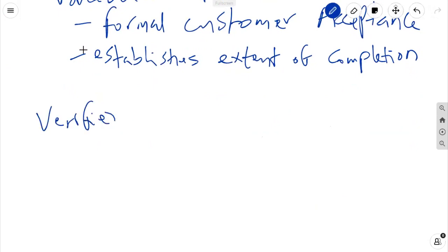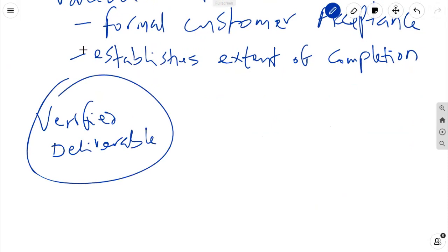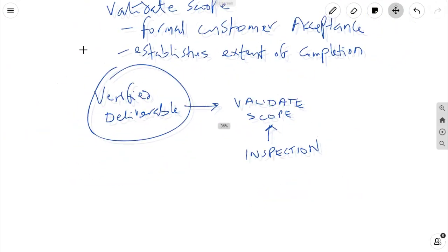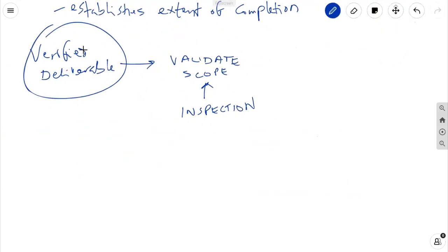Validate Scope tools and techniques. Inspection. This is a technique for ensuring acceptance of project deliverables, also called reviews, product reviews, audits, and walkthroughs. It includes activities such as measuring, examining, and verifying to determine if work and deliverables meet requirements. Decision-making techniques. Group decision-making techniques are used for reaching group decisions where multiple parties may be involved in deliverable validation.